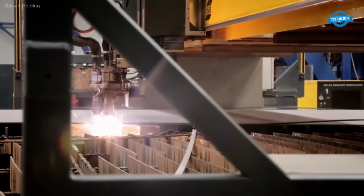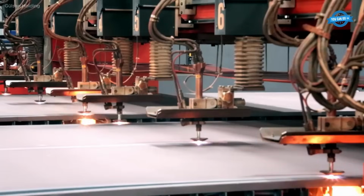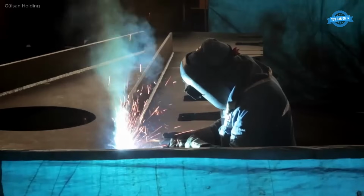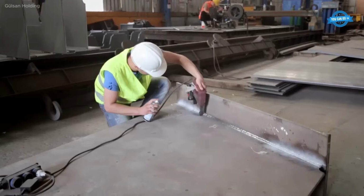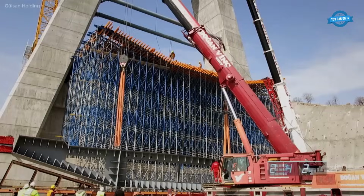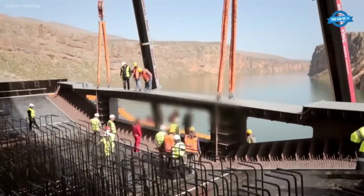The pylons were constructed on both sides of the reservoir, Kata and Siverek, using entirely local resources, construction materials, and engineering expertise. Meanwhile, 6,500 tons of structural steel were fabricated at a factory in Osmaniye, pre-assembled into 250-ton deck segments measuring 440 square meters each, and then transported to the construction site using custom trailers.